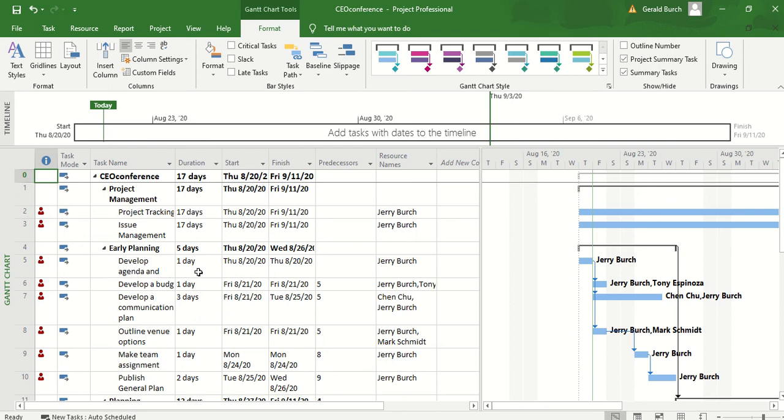The question now becomes which of these tasks should I be the most worried about? Which one should I start trying to adjust? And again, this is where the art piece of project management comes in, because we could scientifically say that there's an optimal solution, but the truth is it's now just getting down to when do you assign yourself different tasks based on the constraints that you have. So one thing that you can do to start trying to help you determine which of these tasks to work with is you can go in and look at when you were over allocated.